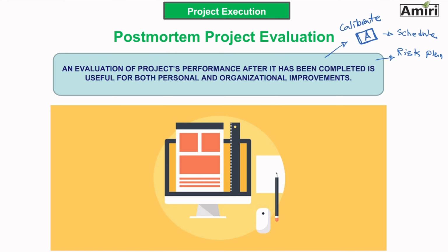We use this in our student challenges. Student challenges such as AIAA, which is an annual student competition, SAE competition, NASA competitions that students attend every year. They do a post-evaluation of those projects and they write a one-page recommendation for the next year's team on what to do and what not to do to succeed in these projects. So that's a post-mortem project evaluation.